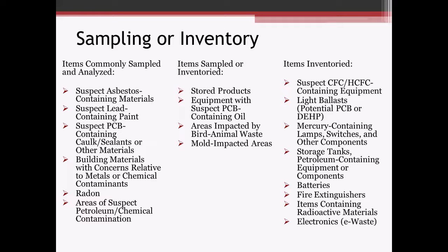Get that in your renovation plans. It's a lot easier to install that type of system when you are renovating a building or constructing a building than it is to install it after the fact. Yeah, it finishes up and now you've got to go tear into the floor, drill into it, cut into it, and install a mitigation system. That's not an ideal scenario.